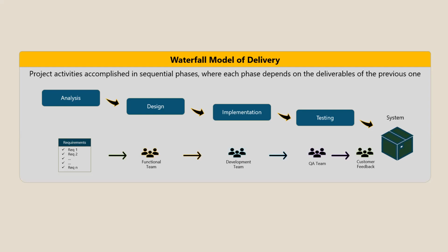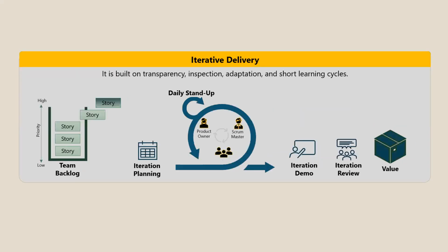But let's look at it from a different angle. When the functional team is interacting with the client, there are 3 critical points which the functional team did not have ready answers to. And they had multiple meetings with the client and came up with an approach. And what did they do? They prepared a set of functional design documents, FDDs. Now the development team is not part of the discussion. What they get is a bunch of FDDs. The functional team says, go through the documents. If you have any doubt, schedule a meeting and we'll look into it. So whatever in-depth analysis or know-how is required to understand the 3 critical areas, the development team may not get everything. And once it comes to the quality team, it's further less. So there are that many more handoffs from the functional team to the development team to the QA team. So this is one of the disadvantages.